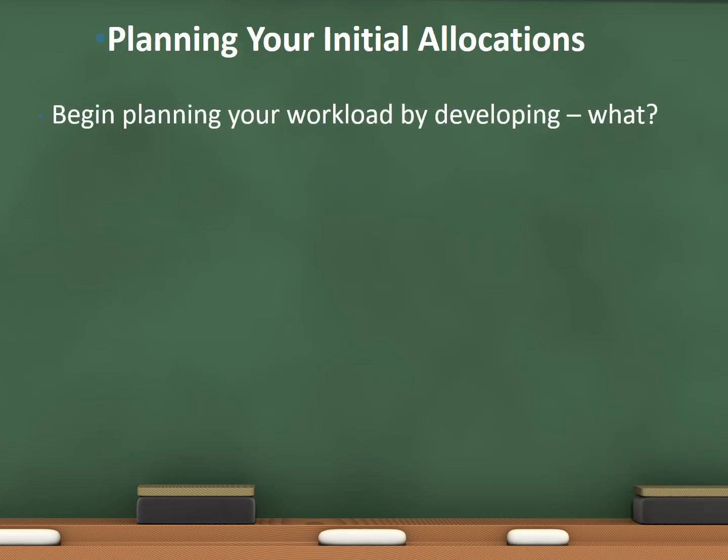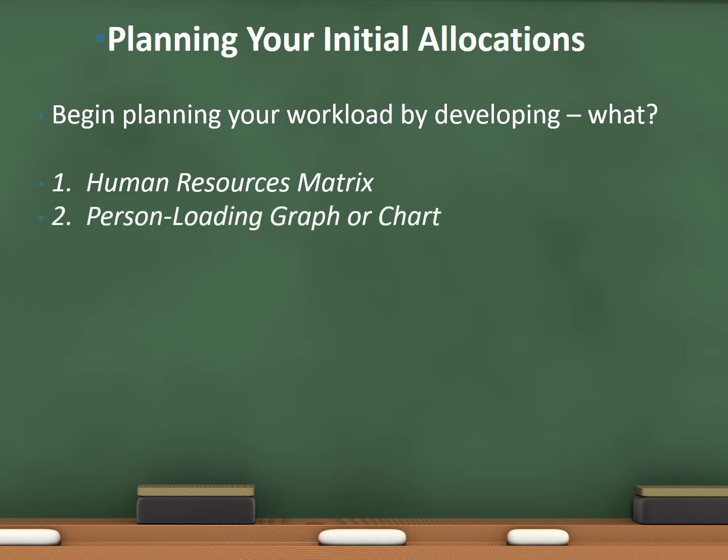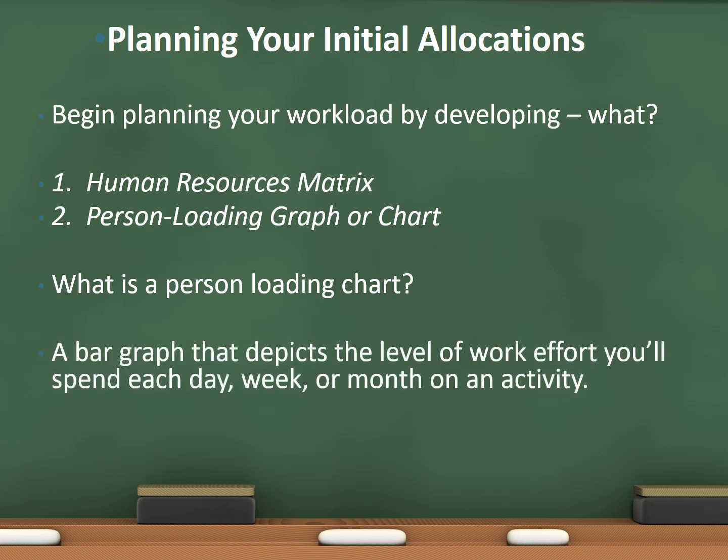Begin planning your workload by developing what? A human resources matrix, a person loading graph or chart. Well, what is a person loading chart? It's a bar graph that depicts the level of work effort you'll spend each day, week, or month on an activity.